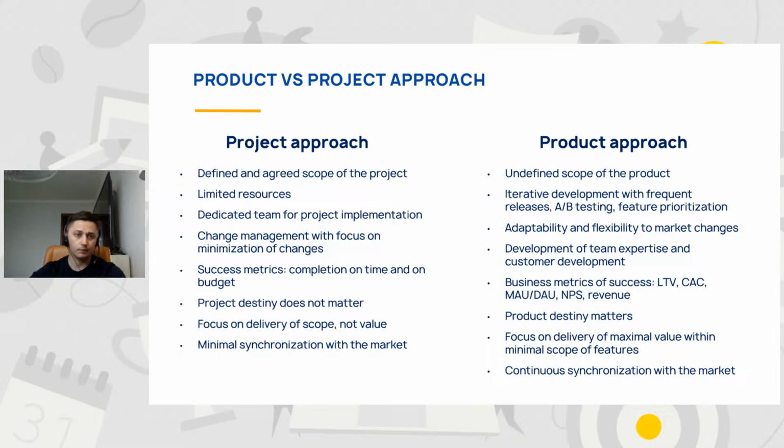And of course, there is minimal synchronization with the market because sometimes when we develop a project, the situation in the market may greatly change, and if the scope was already agreed, it will be quite difficult for you to adapt to these changes with the market.